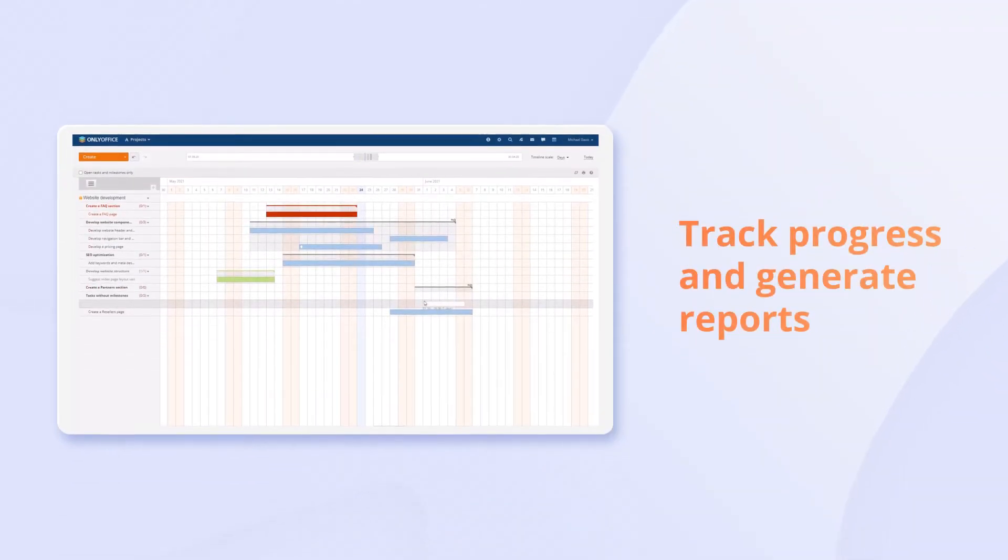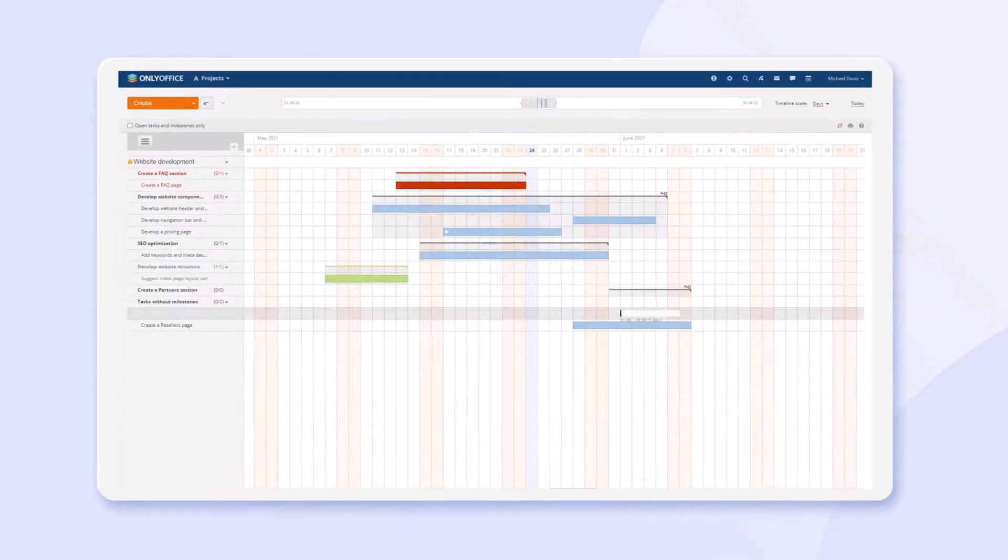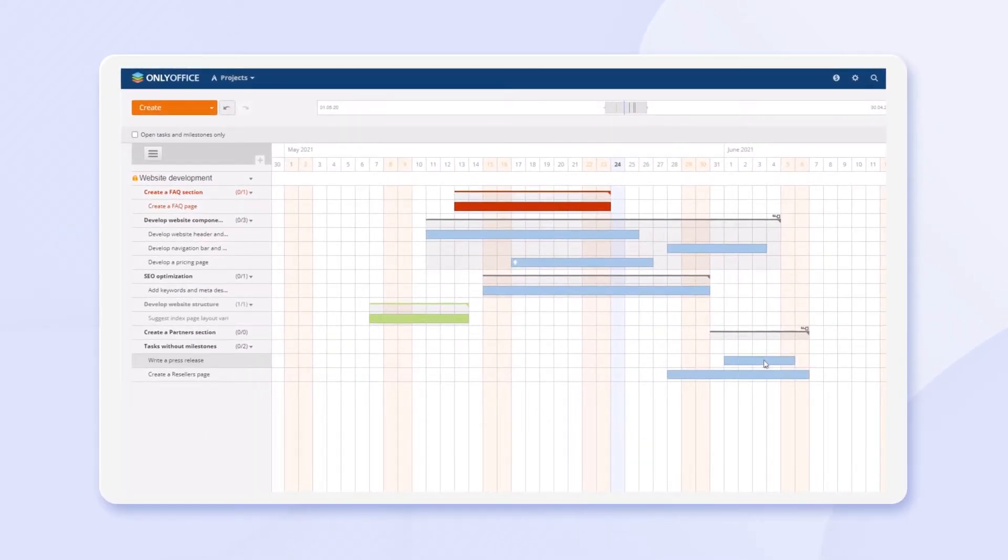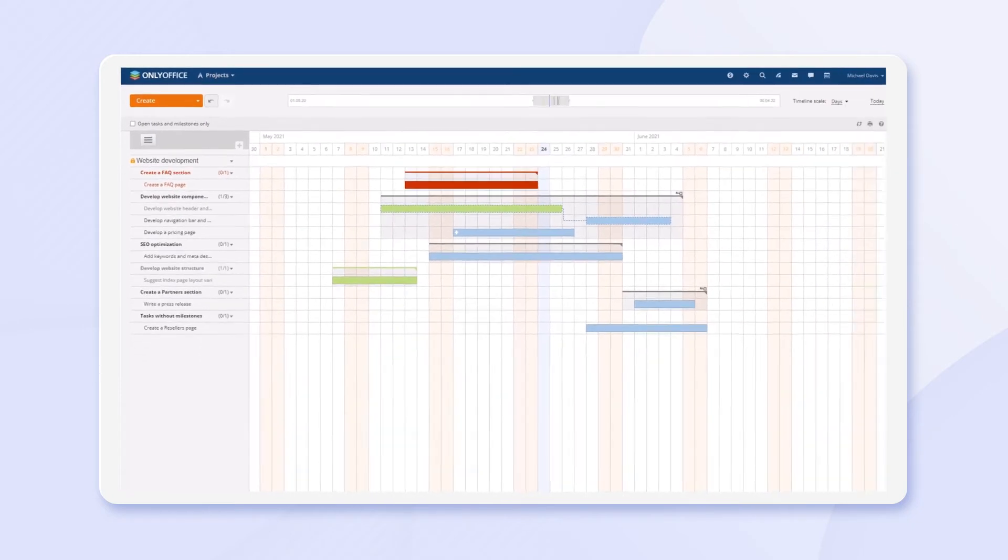Estimate your project with multiple easy-to-use instruments. Use Gantt charts to visualize your project, plan milestones and tasks, link tasks to create dependencies, and see the progress.